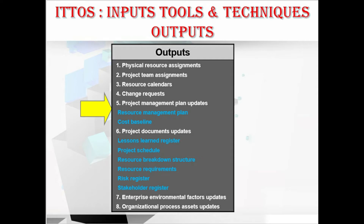For outputs, we have physical resource assignments, project team assignments, resource calendars, change requests, and project management plan updates — consisting of the resource management plan and cost baseline. We also have project documents updates — consisting of the lessons learned register, project schedule, resource breakdown structure, resource requirements, risk register, and stakeholder register — plus EEF updates and OPA updates.